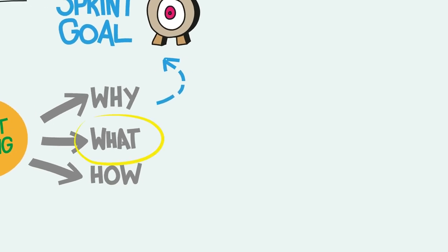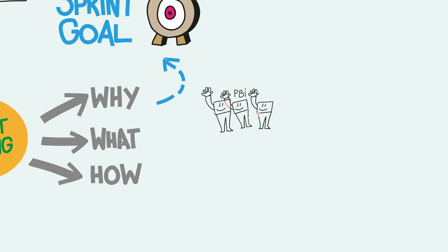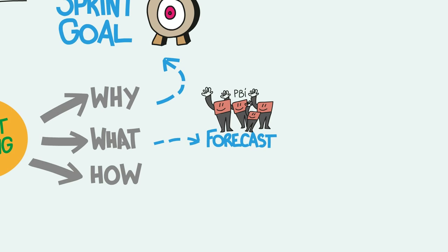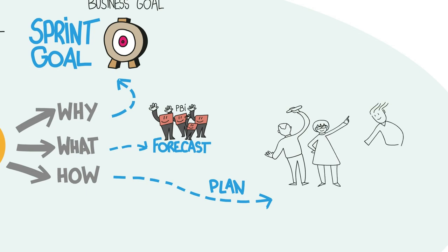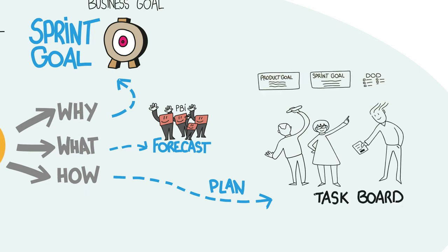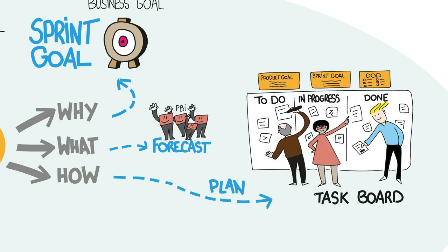What are we going to deliver this sprint? This is a list of backlog items that the team believes will enable them to achieve the sprint goal — I call this the forecast. Like the sprint goal, the team believes it can deliver the forecasted items. How will we accomplish the sprint goal? This is an actionable plan for achieving the sprint goal. The sprint backlog consists of the sprint goal, the forecast, and the task planning, but does not define who does which tasks when.